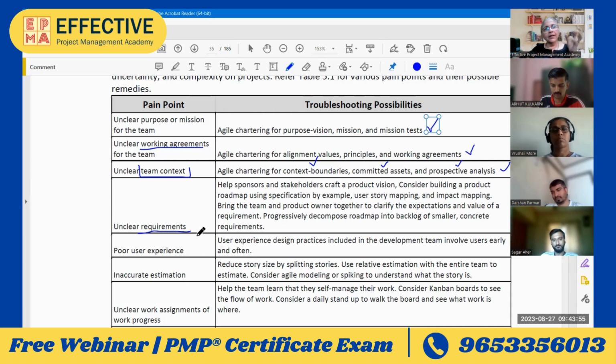Perhaps the seniors, like sponsors and all, need to intervene here and explain to the team why the project is getting carried out. That will do two things: executive involvement is clearly seen, and the purpose becomes clear. So, for purpose clarity, it's a good idea for a facilitator to involve seniors. It will hold good for all the 4 points that we have talked about.